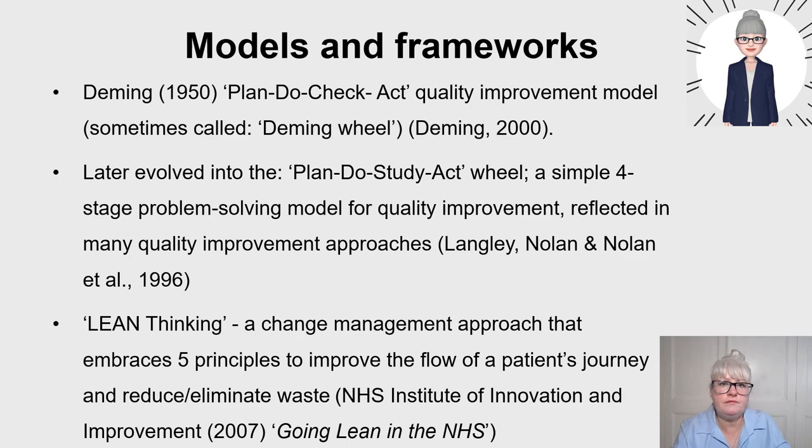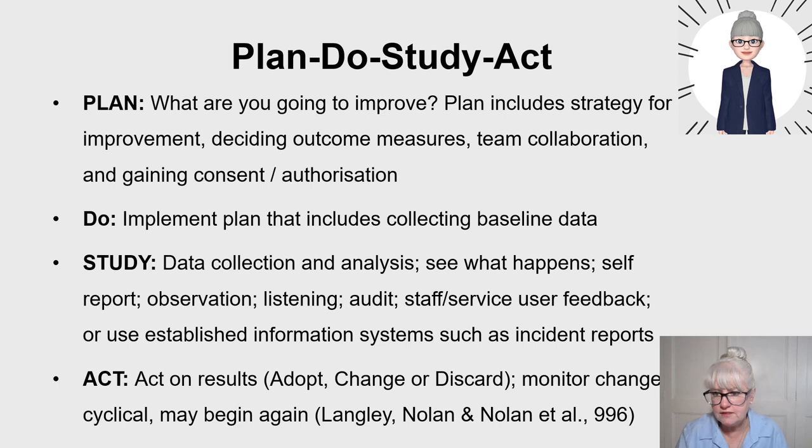So with the plan, do, study, act, now I like this because I like simple, which is the whole premise of my YouTube channel, trying to make practical application simple. So looking at a plan, what are you going to improve? And that plan must include a strategy or proposal for improvement. We talked about deciding your outcome measures, team collaboration, who do you need to talk to before you even start writing that plan, gaining consent and authorization. There's the doing part, so there's the implementing of that plan, and that includes collecting baseline data. So from start to finish, there's the doing.